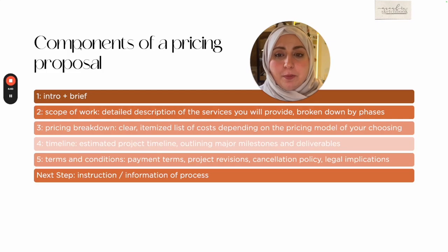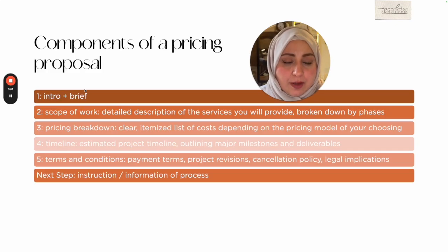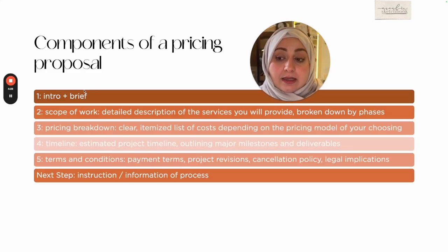As for the components of a pricing proposal, we start with the intro and the brief, and we will exactly say what's happening, where the project is. We will make sure that we address the client name in the beginning, and then we'll have the scope of work, which is a detailed description of the services you'll provide, broken down by phases.